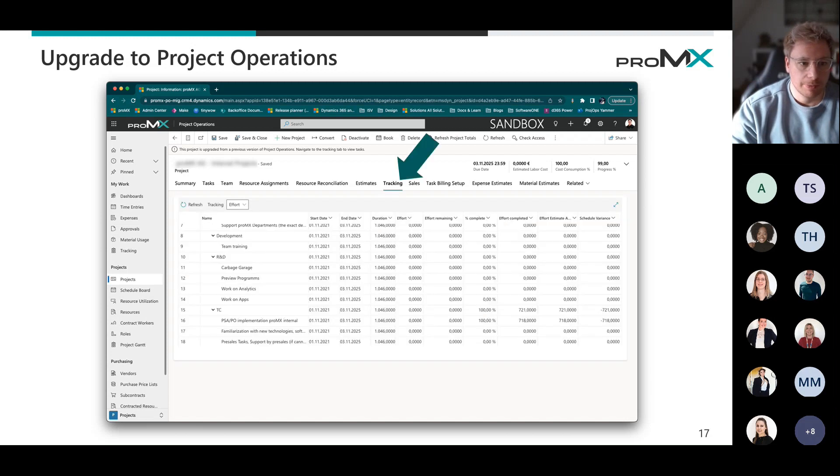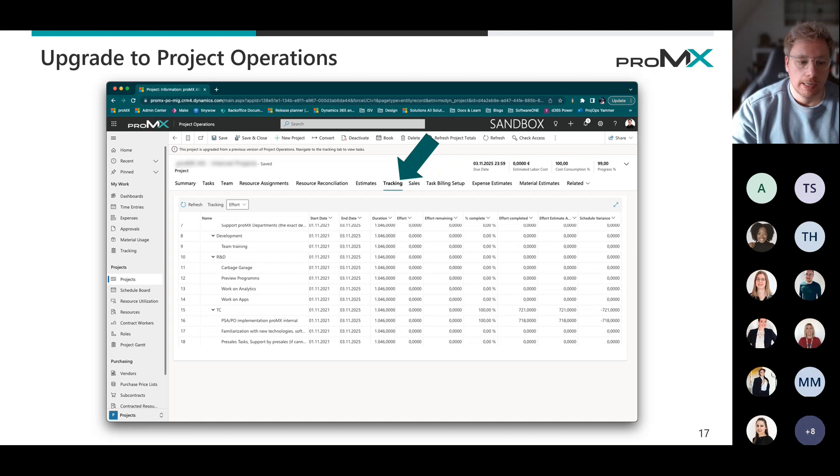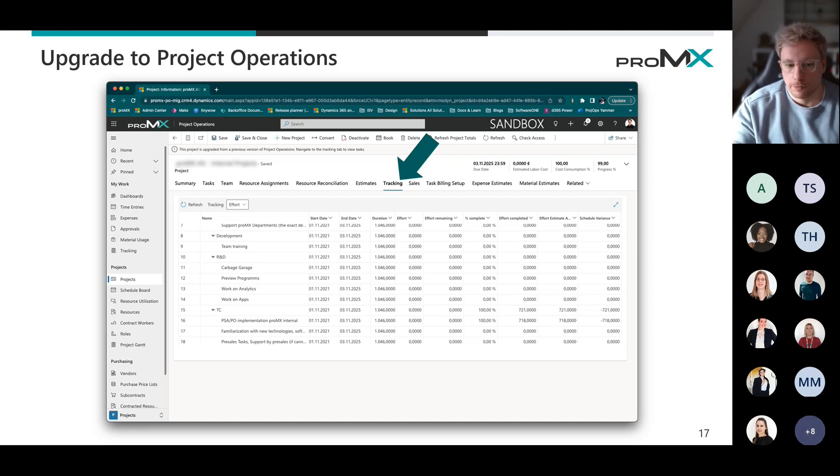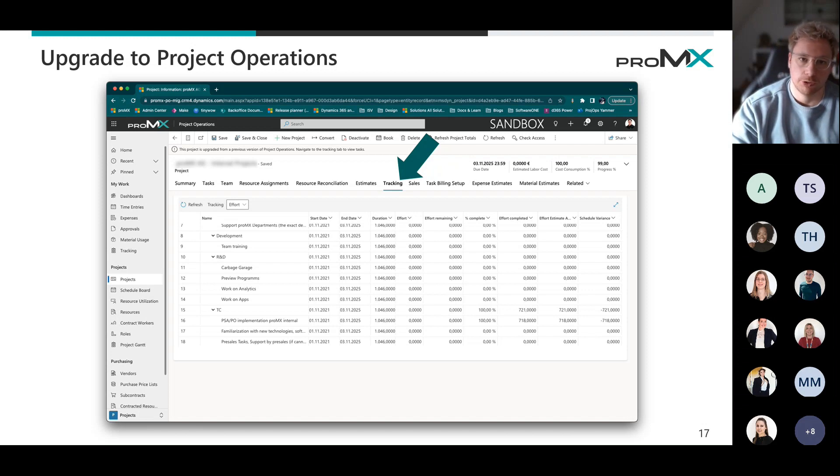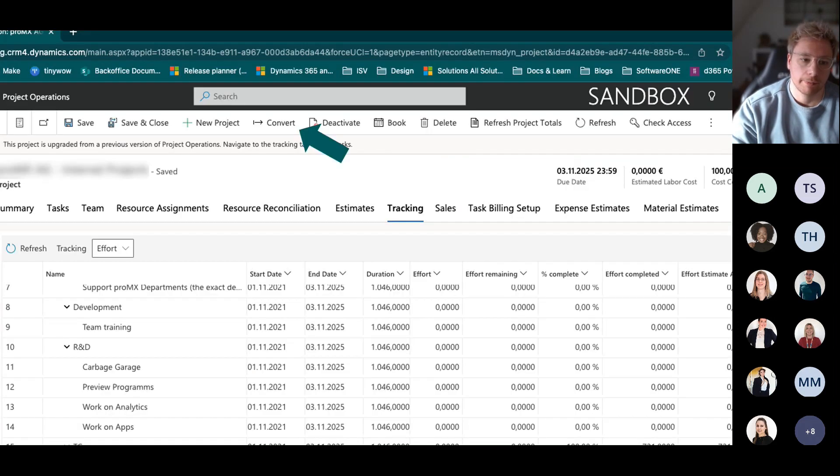So what happens is it basically moves all of these legacy WBS information to the tracking panel right there. And you need to manually convert that project to project for the web so that it can use that integration. And that happens with that little guy over there. So there's this little convert button here.